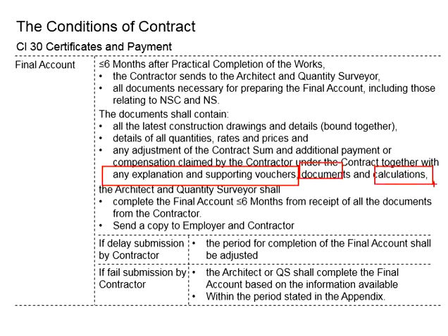You know that in a construction project, there could be several versions of the construction drawings. Some changes may be made during the construction process. Regardless of how many versions there are, the final version shall apply. This version should ultimately be what is actually being constructed. Whatever has already been superseded or is outdated shall not be taken into consideration in compiling this final account.